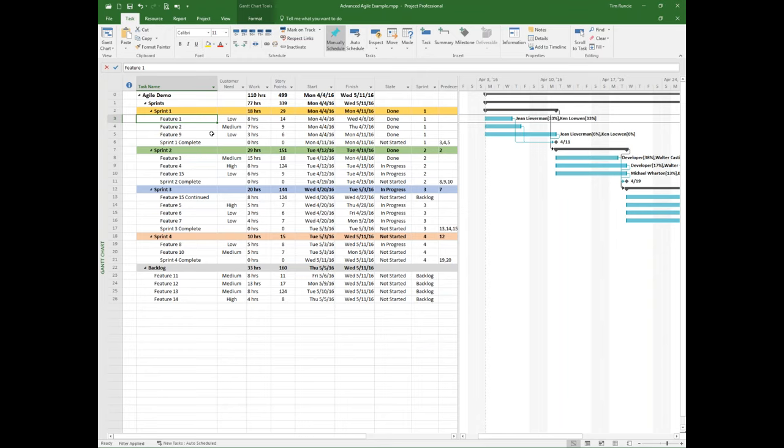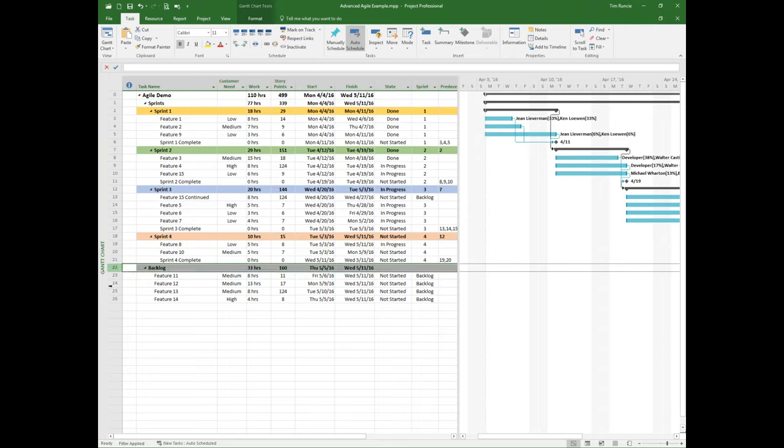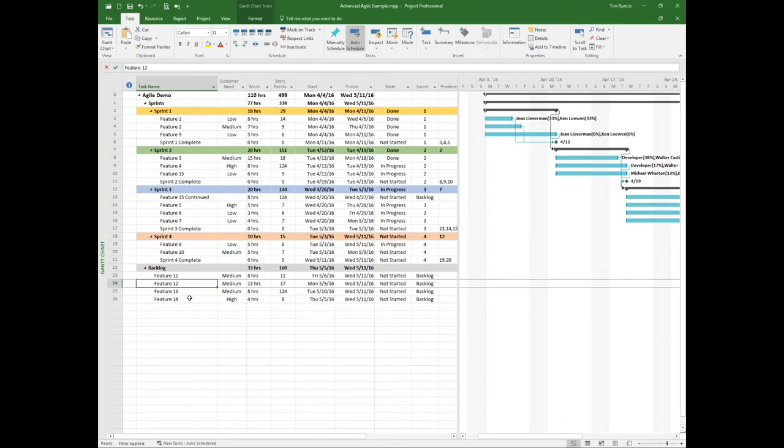Now, whether you want to do a sprint and you're going to put features or you're going to put sprint, you might put user stories. And under your user stories, you might have features. It doesn't matter what label you tack on it. But the idea is that you have a hierarchy of things that roll up or roll in together. In fact, very commonly, an epic itself might be the project file. And the project file is something that you'll work with to say, here's what we're managing. This is the entire epic.